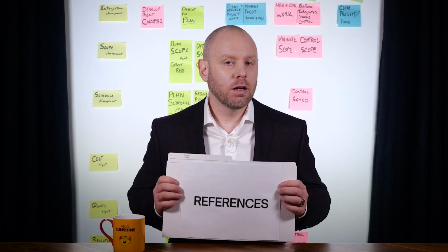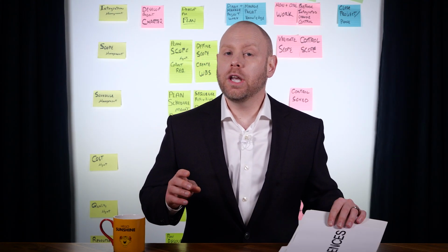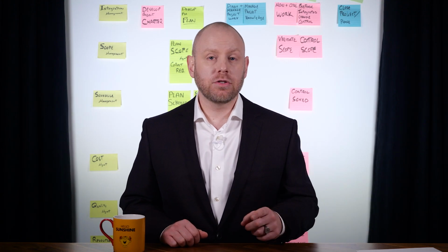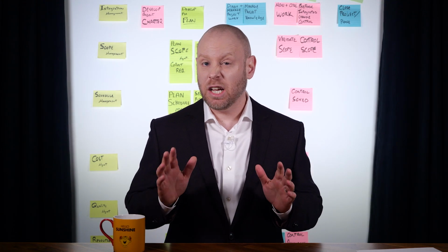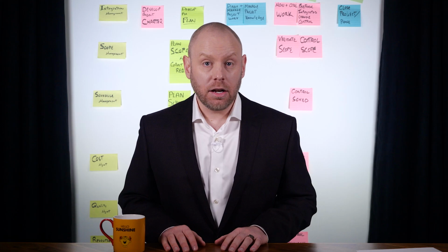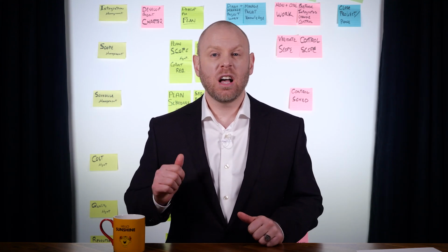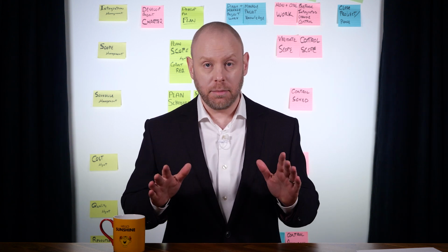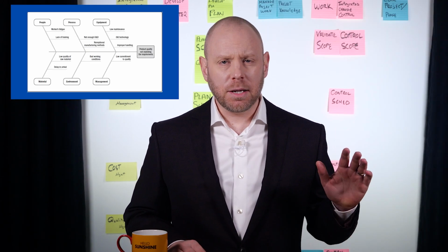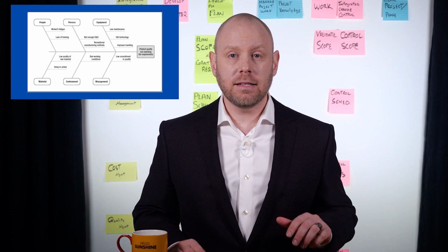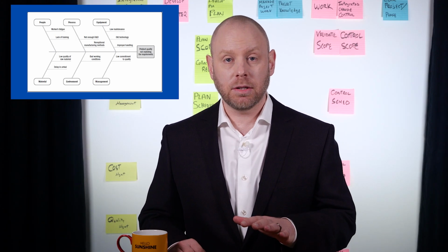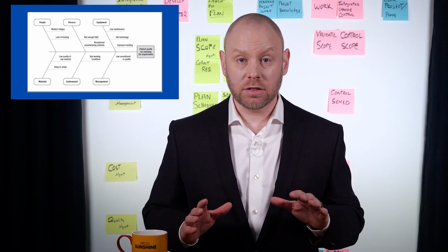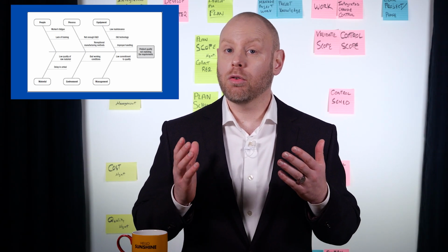As before, with our references in hand, we can use expert judgment, data gathering through brainstorming, checklists, and interviews, analyze our data through root cause analysis, assumptions and constraint analysis, SWOT analysis, and document analysis. Root cause analysis, sometimes referred to as a fishbone diagram, is a method of identifying a symptom or outcome and deconstructing that outcome into its various causes, ending with a root cause.